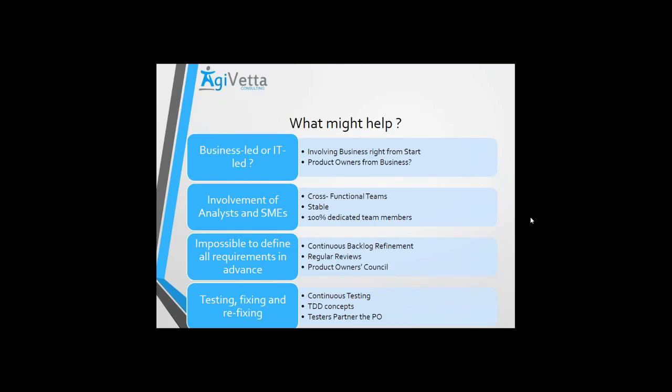Now this is where, as I said, still involving them as stakeholders in your regular meetings, plannings, and design phases is very important. And vice versa, a team which is working with agile practices should participate in the meetings that the other team is doing. So that is the first part of it. Second, you need to have regular checkpoints or connect points where, for example, they are working on the design and there's a design output day or design complete day. That's where the team meets together and sees what impact it would have on our system. So this becomes a continuous exercise.